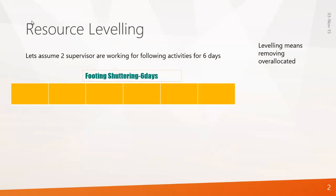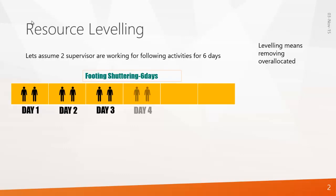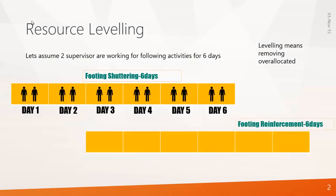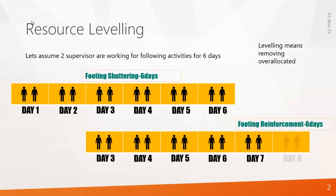In this example, we have an activity called footing shuttering, which is of 6 days where 2 supervisors are working per day — day 1, 2, 3, 4, 5, and 6. From day 3, another activity starts: putting reinforcement, again for 6 days, with 2 supervisors working per day. Also, in our company, we can supply a maximum of 2 supervisors per day.